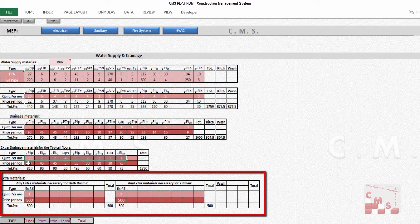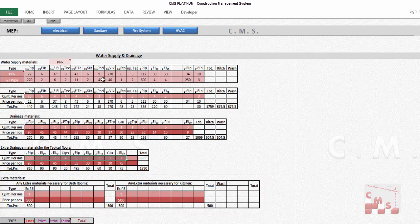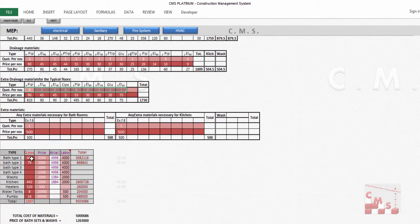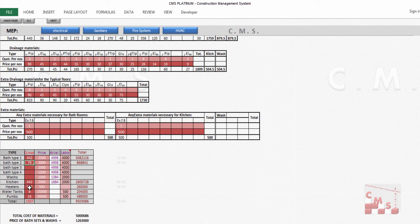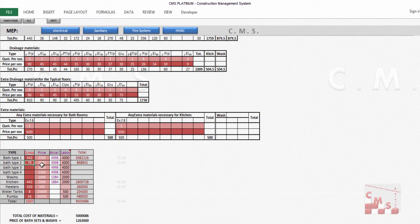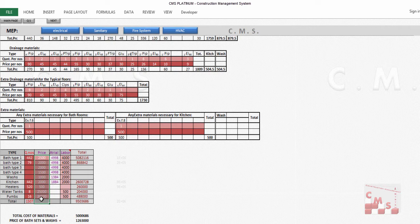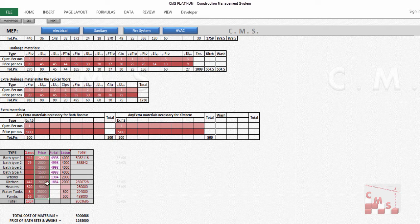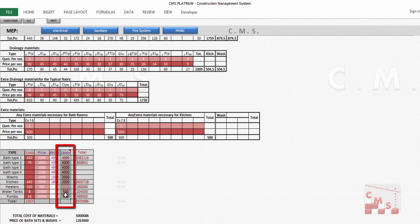Whatever extra materials you have, you can add here. This all will be calculated for one bathroom. When you insert the numbers of bathrooms, kitchen, or wash, it will be calculated directly—all the material required for this project. You'll also insert the price for items like bathrooms, wash, kitchen, heaters, pumps, and tanks, and the labor charge for each bathroom.